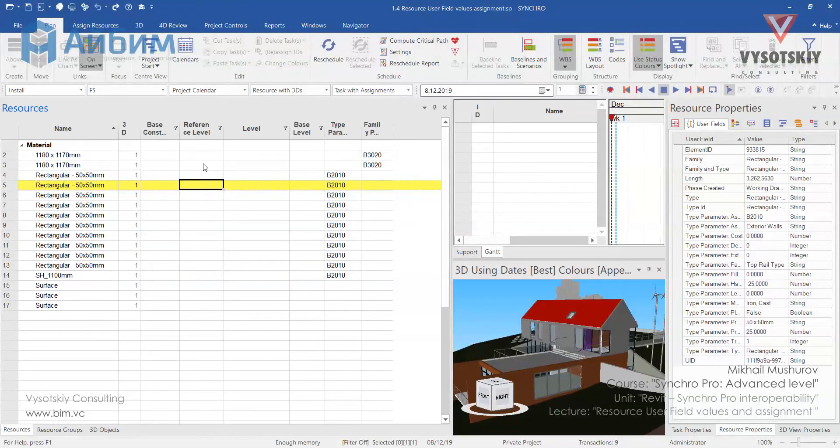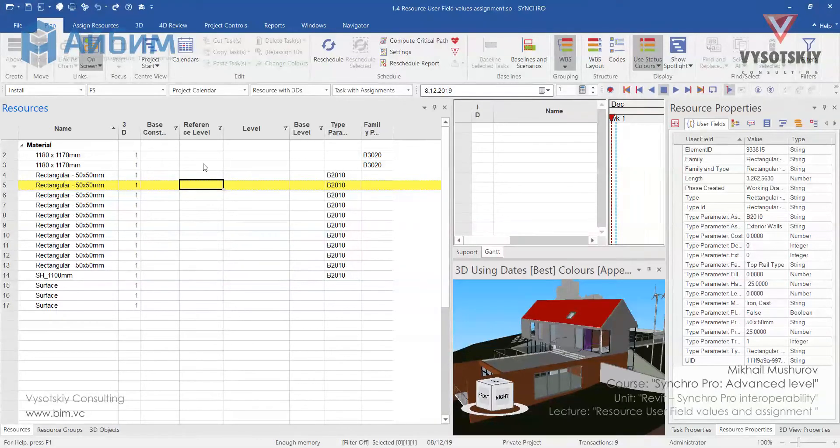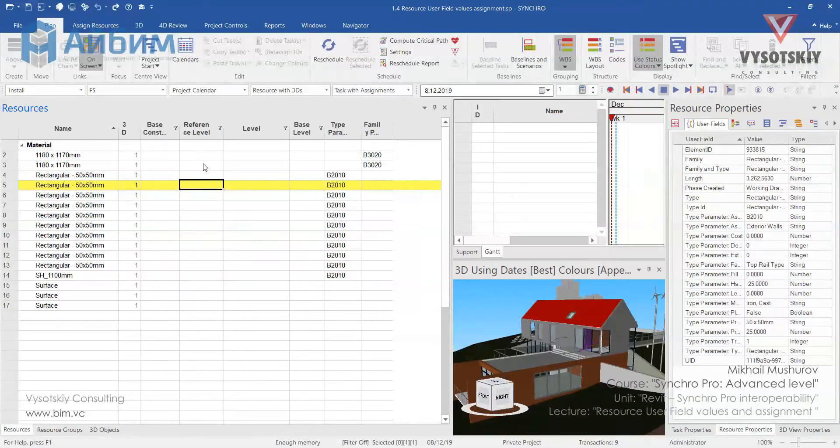Please remember, if you have a parameter in Revit but it doesn't have any value, it will not be displayed in Synchro.